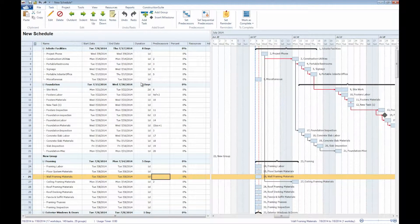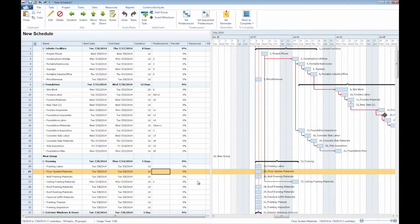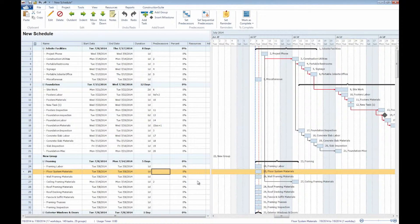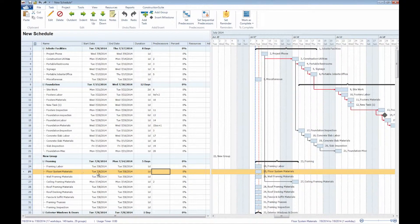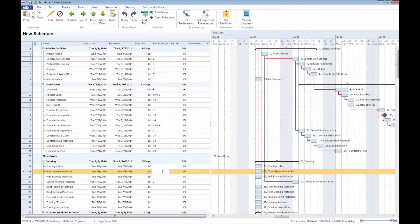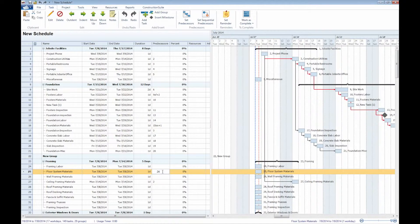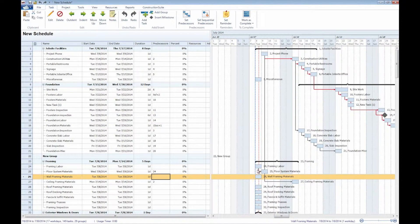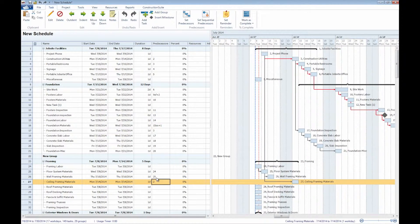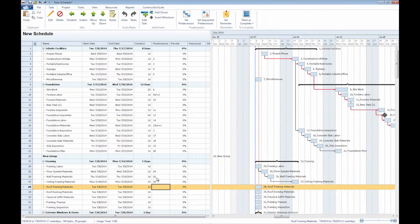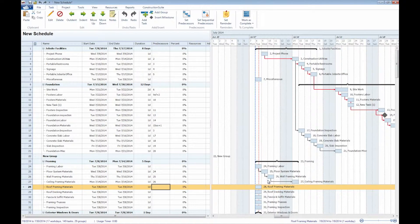So now as we step through these individual columns, we'll see that with the predecessors specifically, we can tie specific relationships to these individual tasks. So if we see that, for instance, the floor system materials, for the sake of example here, are going to follow the framing labor task, then we would simply input the task list number 24, as denoted here, as the task that our floor system's materials should follow. Once we do that, we will notice that there is now an arrow showing the linkage between these two tasks, and we could continue on throughout the rest of this group in the same way. Notice that each time I enter in a predecessor, that relationship is shown with the arrows in the Gantt chart.